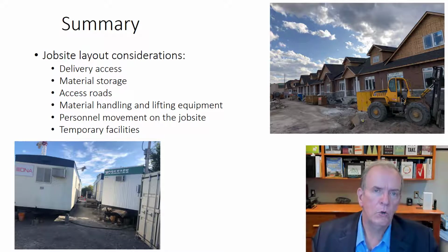And you know what? You can coordinate a lot of equipment too with the various trades. Sometimes a trade may have a specific piece of equipment. Well, does it make sense for every trade to have that specific piece of equipment on site? Now you're overrun with this equipment taking up all this space if you had 3 of these. Whereas maybe you can work out a deal with the sub-trades that they share it, or one trade gets their laborer to move some stuff periodically for another trade. That can be a big cost saving.